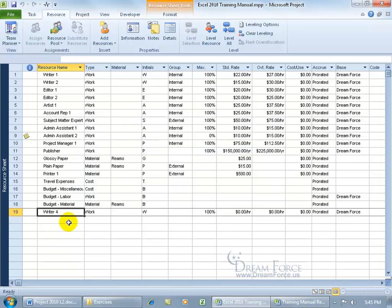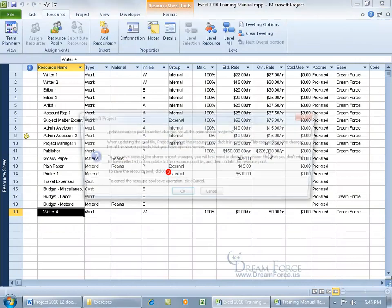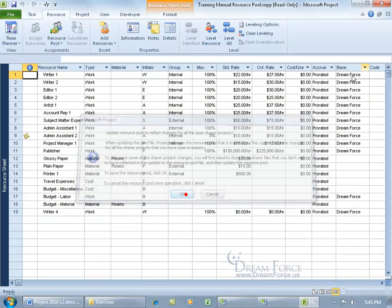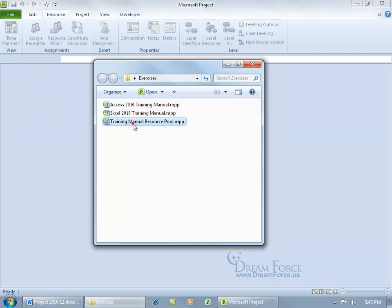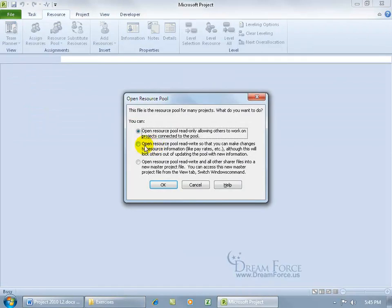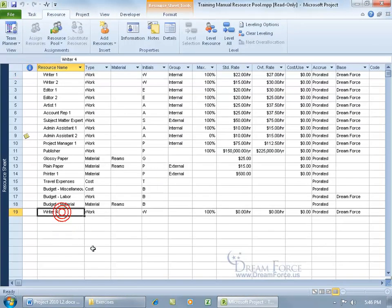The downside is that because Writer 4 has been assigned to a task in your project, the resource pool will add Writer 4 into the pool itself. Close out, say yes, click OK, close out, then open the resource pool and click OK — you can see Writer 4 is now in the resource pool.